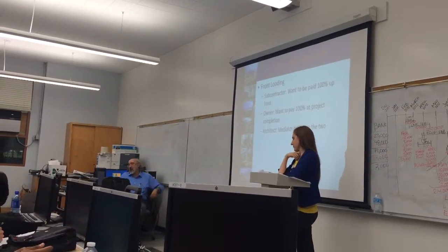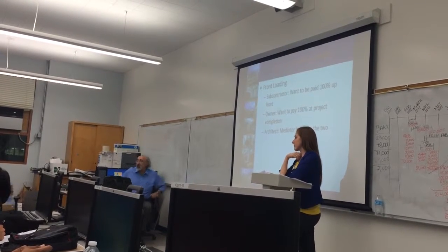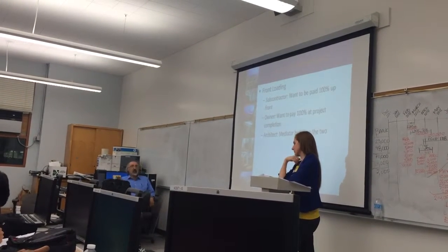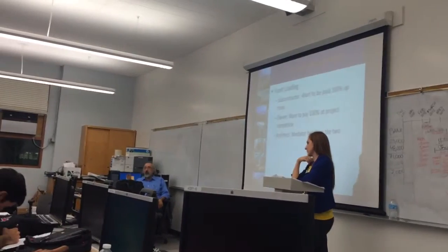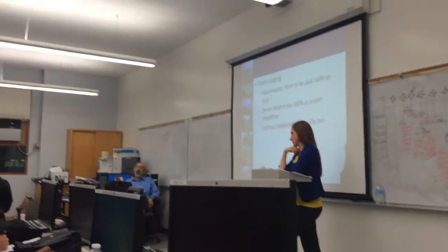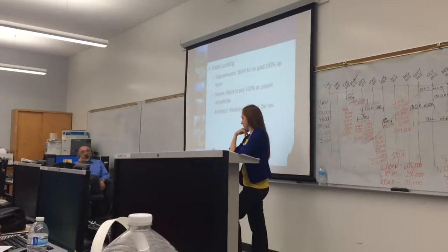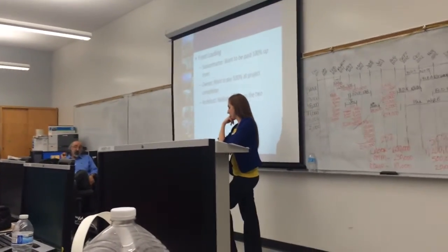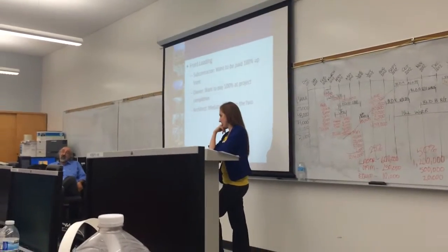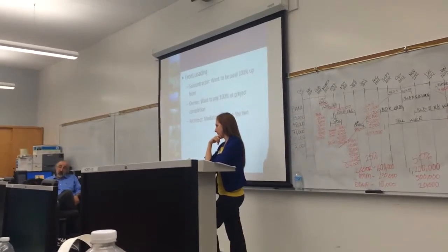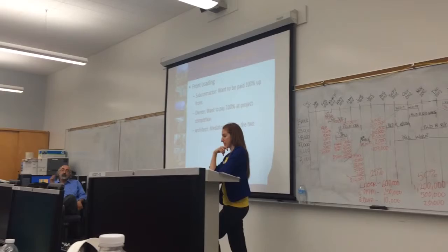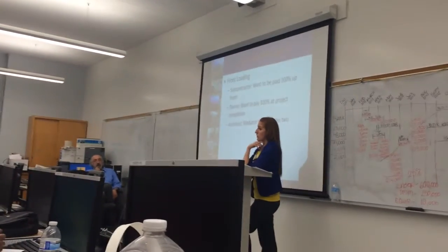Because that loss came from, not you, it must have been an error on the drawing. The architect might have made an error, the engineer might have made an error, and you shouldn't be penalized for it. So at the beginning of the contract, when you negotiate, a lot of general contractors establish that additional percentage for any change order. It gets eaten up really fast though.